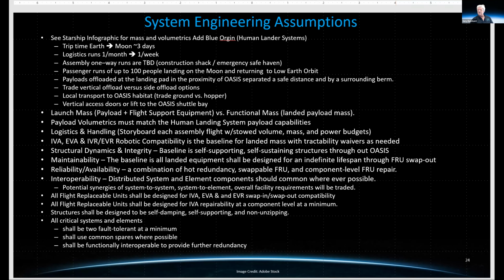That is, I would believe, the most conservative approach that we can take on this, and something that would be instrumental. A key thing from a systems engineering perspective is figuring out what the top level requirements are that you're going to work to. An example of this is the space station program, where I owned the system level requirements for advanced automation and robotics. I successfully made the case that the space station remote manipulator system defining load should be the ability to accommodate a fully loaded space shuttle, both payload bay and crew. And that ended up driving the design in some respects of every element and distributed system on the station. But it turns out it was the right thing to do, because that means that system performance enveloped anything that would be asked of it on the International Space Station.